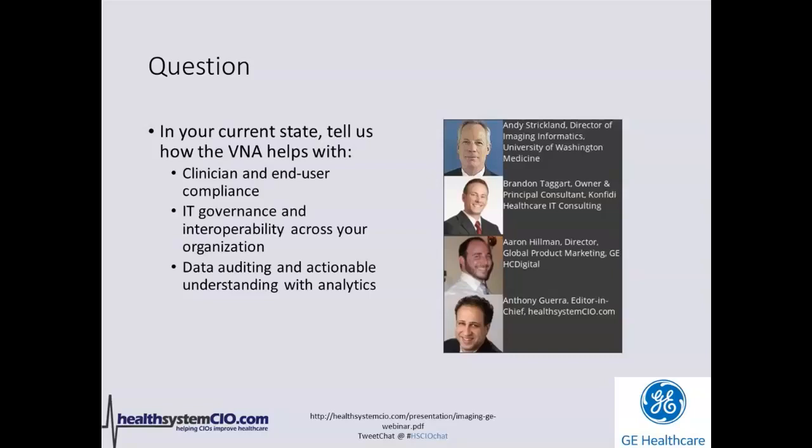If the organization does not have involvement from the highest echelons of leadership, and I'm talking CIO level, possibly above, in terms of being involved in the project from the get-go, you're going to see some issues in terms of not understanding the true strategic direction or business cases that you're trying to accomplish. So governance is really the foundation of starting your project.